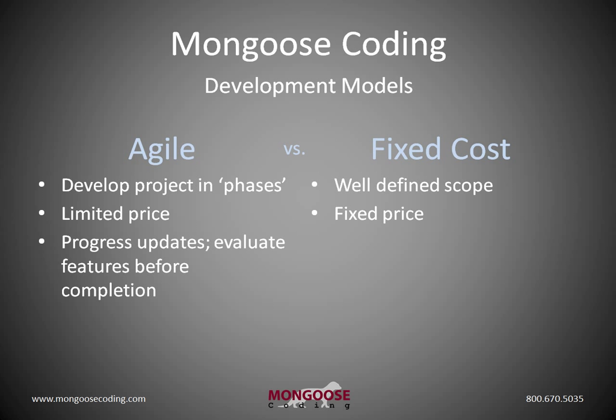Like the scope, the cost is completely determined before starting a fixed cost project. But for an Agile project, the cost is partially determined before starting and partially determined during development — it's affected by the feedback and decisions made during the progress updates and the prototyping phases.